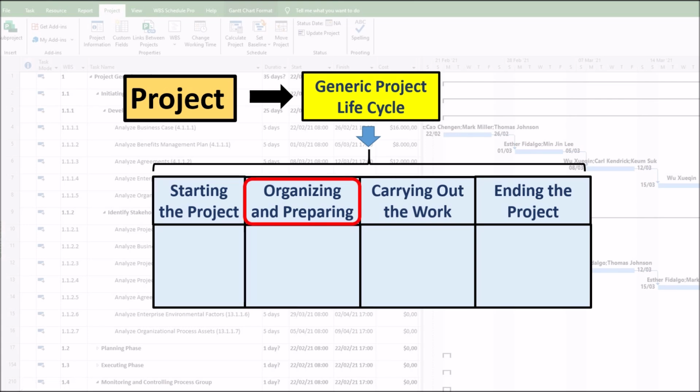The organizing and preparing phase is a project management phase that involves developing a plan for a project. This phase involves developing: 1. An integrated project schedule to coordinate the activities of the design, procurement, and construction teams. 2. A detailed budget to enable the project team to track project expenditures against expected expenditures. 3. A conceptual design and detailed drawings for use by the procurement team to begin ordering equipment and materials for the implementation team to develop labor projections, refine the construction schedule, and set up the campus site.